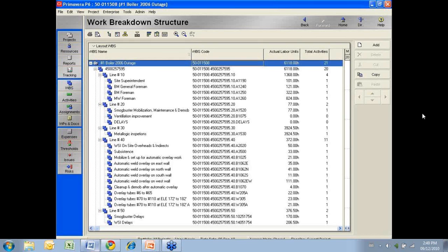We can bring in the hours on a daily basis or a weekly basis or a monthly basis. Whatever business requirements you want us to follow, we can accommodate. Recognizing that you want to do S-curve type reporting, resource loading type analysis in Primavera, we typically see most companies want to see that information posted to Primavera on a daily basis.